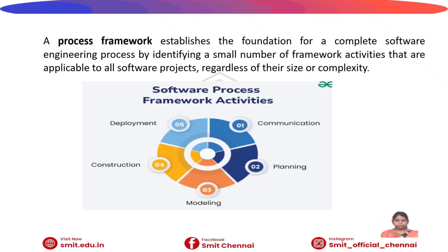The steps in the framework are communication, planning, modeling, construction, and deployment. Communication is the first step of the software process. Before any technical work starts, the software team must interact with the customer and the stakeholders to get the customer requirements and objectives through discussions and interviews. In the planning phase, the software plan is created. The plan describes the technical tasks performed during development and also specifies the possible risks, resources such as people and tools, and the schedule for completing the work.